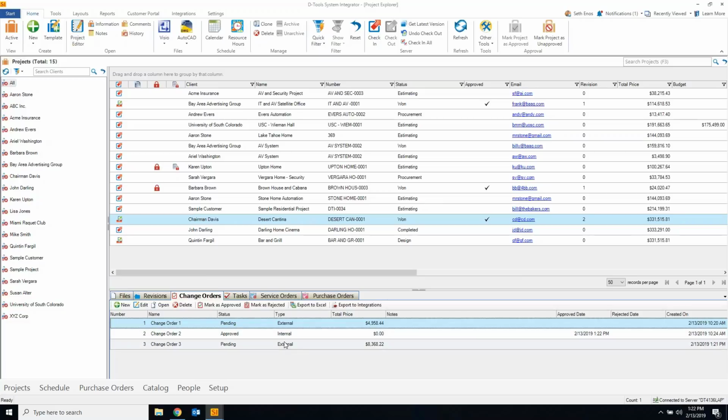The other thing that we added for change orders is the ability to delete an approved change order. When we initially released this, we made it pretty rigid. We wanted to keep the model as simple as possible. You approve it, you're not able to then delete that. That's a change that you put in there. If you wanted to back out of that, you'd have to create another change order. Well, that didn't sit well with some of our users. So, of course, they gave us feedback and said, it really would be nice, guys, to be able to back out of a change order. I accidentally approved this, or it's not even accidentally, the client simply changed their mind 10 minutes after approving or the next day. I really just want to be able to back out of that.